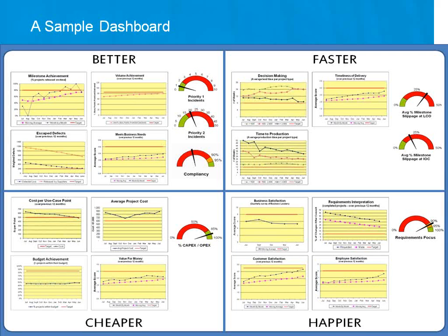Even with waterfall projects, you can, again, take their list of requirements, the commitment they made, and compare it to the end. What you'll find with most agile and iterative projects is, although there is this myth that iterative and agile projects are always de-scoping and always changing, the vast majority actually deliver more story points or use case points or function points than they originally committed to. They're just not the ones that were predicted at the beginning. And waterfall projects traditionally fall short with de-scoping at the end. That's the kind of measure we can use that's process independent.